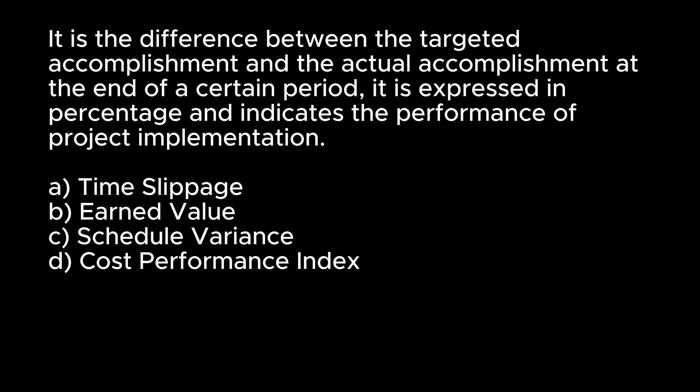It is the difference between the targeted accomplishment and the actual accomplishment at the end of a certain period; it is expressed in percentage and indicates the performance of project implementation. A. Time slippage. B. Earned value. C. Schedule variance. D. Cost performance index. Answer: A. Time slippage.